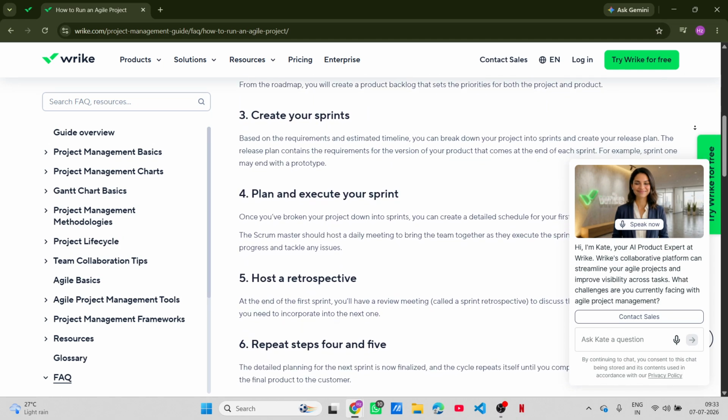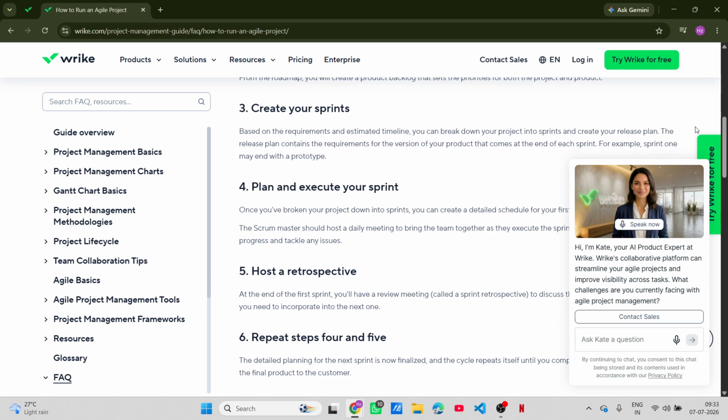Next, let's set up your project for Agile methodologies. You'll want to select a board view, as this is where you can create a Kanban-style workflow. This visual representation is key in Agile management because it allows you to see tasks and their statuses at a glance. In the left sidebar, look for your project, click on it, and then find the option to switch to board view. Once you're in board view, you can create columns that represent different stages of your workflow.